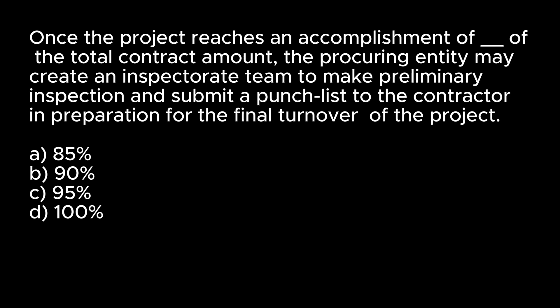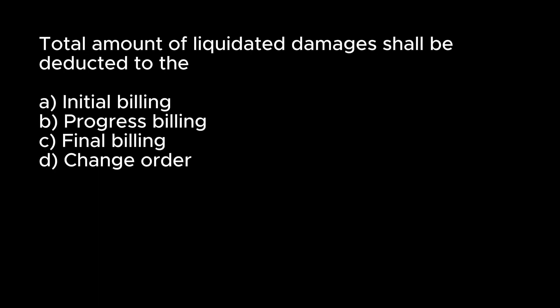Once the project reaches an accomplishment of blank of the total contract amount, the procuring entity may create an inspectorate team to make preliminary inspection and submit a punch list to the contractor in preparation for the final turnover of the project. A. 85%. B. 90%. C. 95%. D. 100%. Answer: C. 95%. Total amount of liquidated damages shall be deducted to the: A. Initial billing. B. Progress billing. C. Final billing. D. Change order. Answer: C. Final billing.